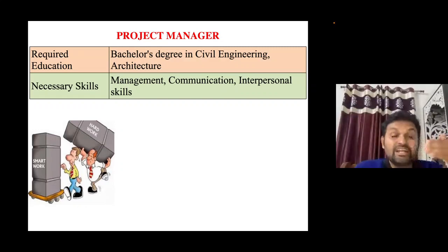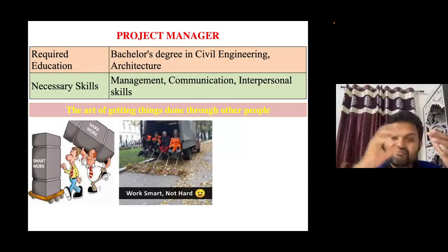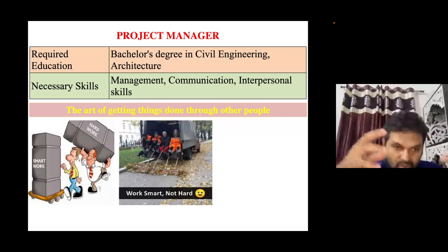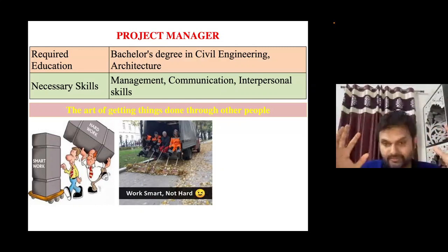So he said, yes, we are going to do the same job, but in a slightly different manner. What is the manner? Other than working individually, patch wise, we all will work parallelly. How are we going to do the work? We are going to sit in the truck, other than bringing the truck at last. We are going to collect the garbage with the same equipment which we are using right now. Once the garbage is more, all three of you are going to fill that garbage into the truck, right? So that whatever we are able to do in series, we are able to do all our work in less than 50% of the time with the same resources.